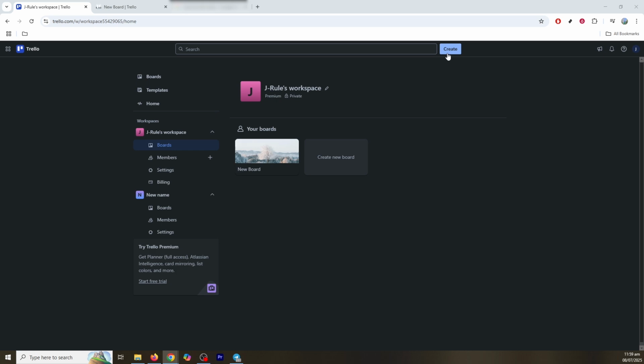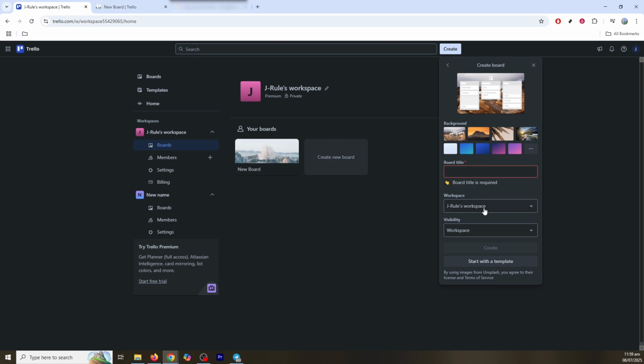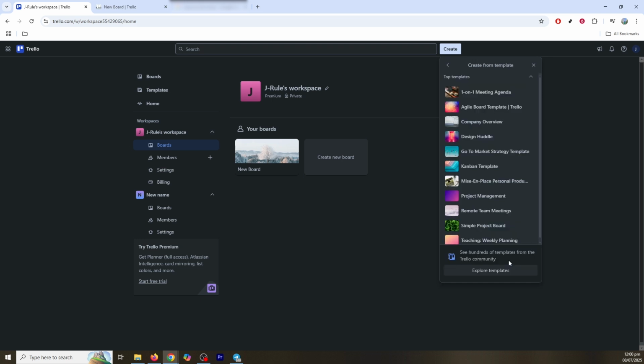To create a new one, select the Create button on this page. You'll then be presented with options to start a brand new project board. Here's where the fun begins. You'll have the opportunity to either use a pre-existing template or start fresh. For our walkthrough today, we're going to make things easier by selecting Trello's built-in Kanban template. Go ahead, click Create, and then find and choose the Kanban template.